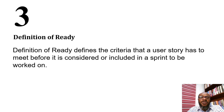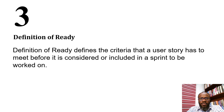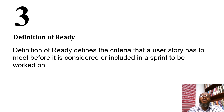If you commit a user story to a sprint without proper refinement or stakeholder agreement, it will create problems. Definition of ready criteria can include: has the value been clarified, has the user story been estimated, is the end goal clear, is there consensus among stakeholders on the value it creates? We measure user stories against these criteria before committing them to a sprint.